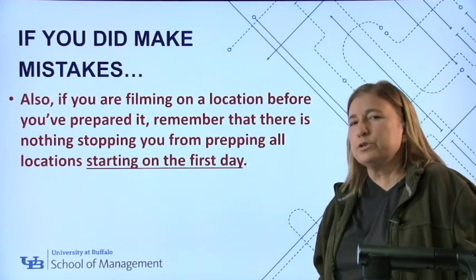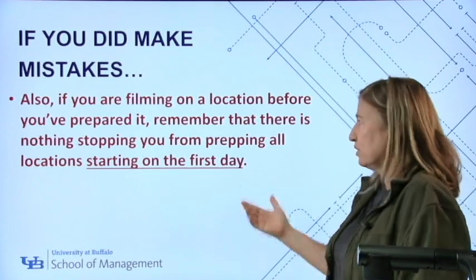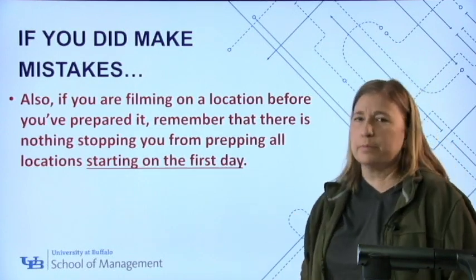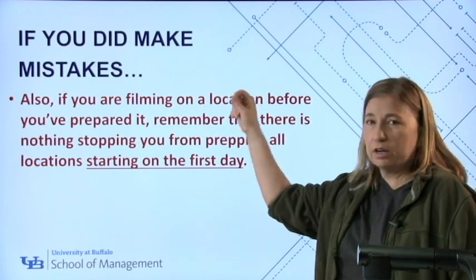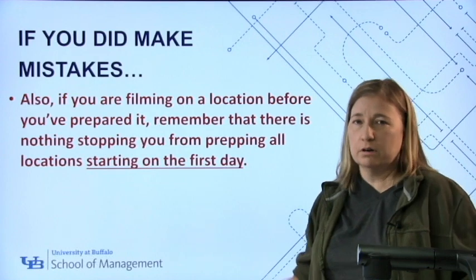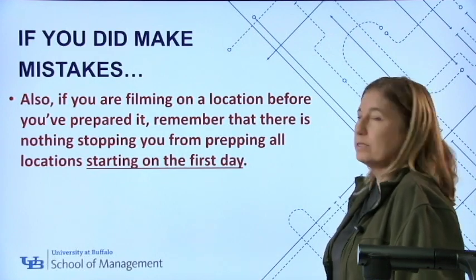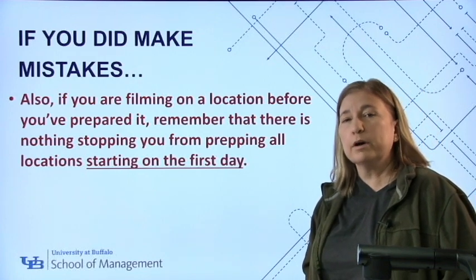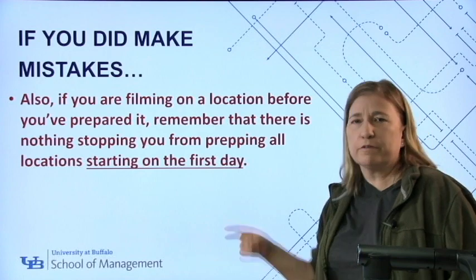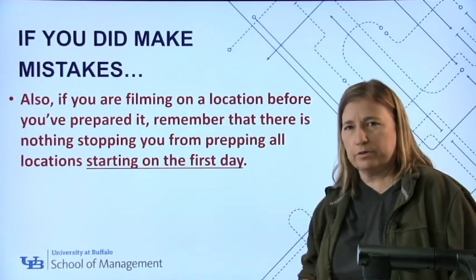There's nothing that stops you, when not filming in London, from preparing locations. There's actually technically nothing that stops you from preparing all the locations starting on the first day. That work is then just done, like you would mark it off your checklist or your precedence diagram, and from that point forward you don't have to ever worry about scheduling something to film there when in fact you haven't prepared it, because you prepared everything on the first day.